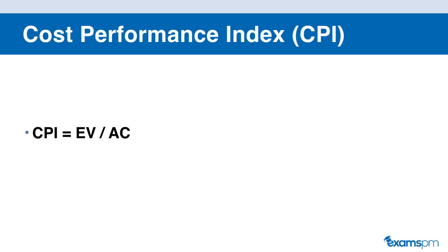What the Cost Performance Index allows you to do is to compare projects in your organization that are of different sizes. So let's say that you have one project that's over $1 million, and then you have your current project which has a budget of $10,000. So if you just see the cost variance was $1,000 on your project, and then the cost variance on the $1 million project is $10,000, then you can't really compare these two because they have different budgets to begin with. But if you convert everything into an index, then that tells you the scale at which this project is over or under budget.